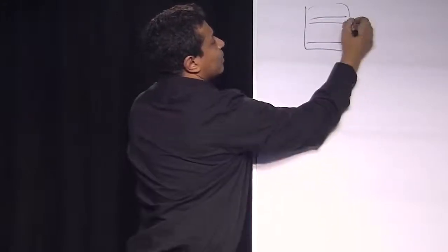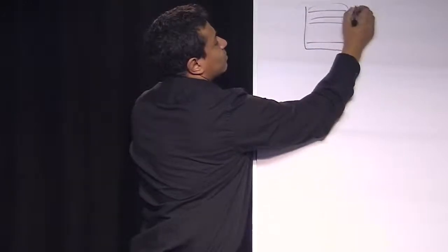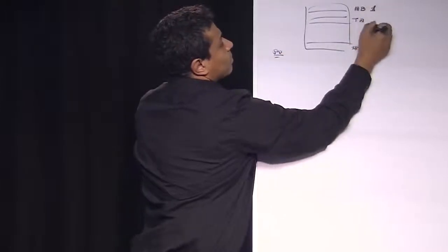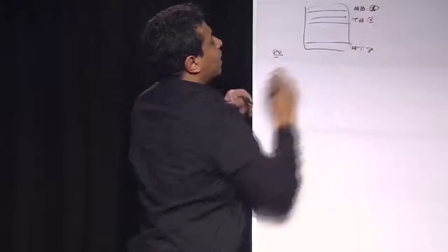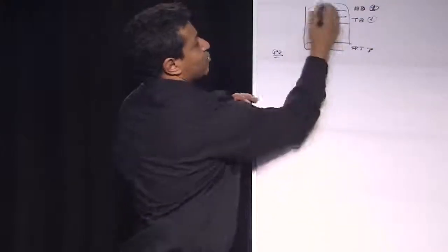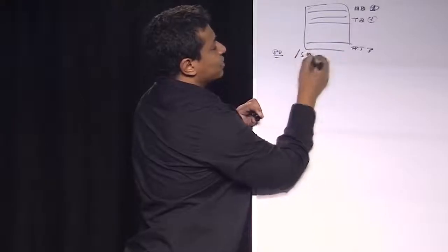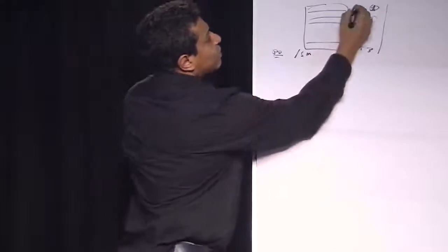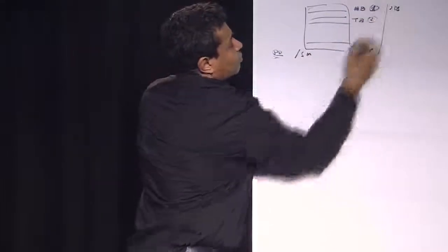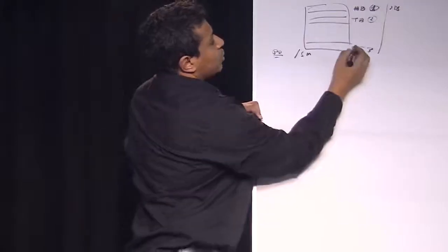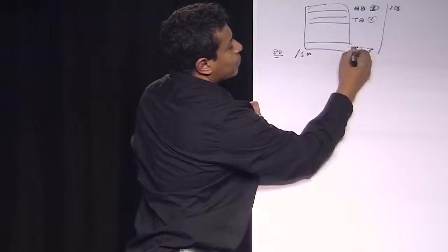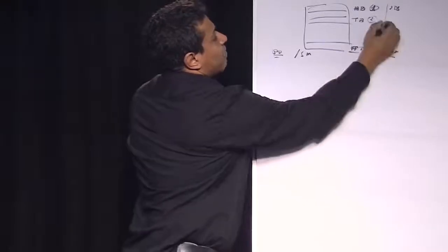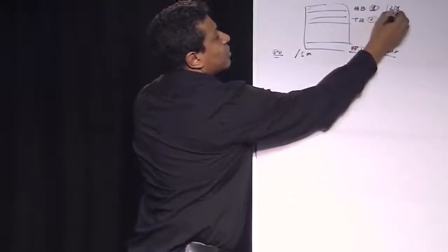So footer, toolbar, header. Me, the product owner, I have this priority: 1, 3, 2. And in my backlog, I have set this priority. But me, the Scrum Master, I will tell you that this is not the right way to do it. Why so? Because if I do this, it will take me 2 days, which we don't have. And I think it's better to begin with the footer, which is 1 day, that you're going to see fast, and after the toolbars, and after the header.